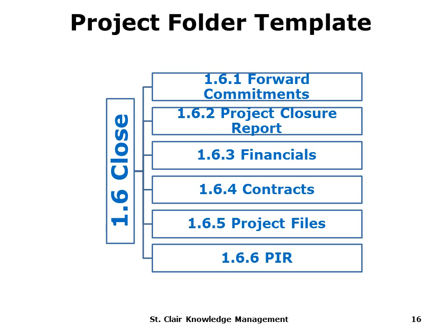So typically about 6, or even 9 months after the project has gone in, you stage a meeting with all the various stakeholders, sponsor, the users, the customers, perhaps suppliers, and you have a meeting about the project itself, and you're assessing whether 6 months or a period of time after it's gone in, the project is still delivering what was required, and the benefits that were identified in the business case are realistic and being produced. Okay, so that's basically your closed folder and the subfolders within it.